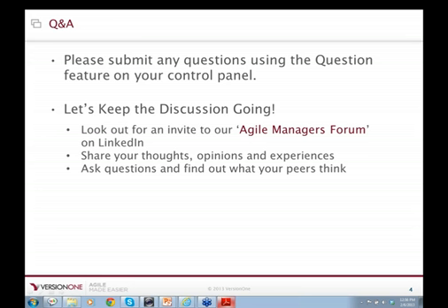One of the things that we've been talking about is putting acceptance criteria on every single level. So to answer the question directly, if an epic has acceptance criteria and a definition of done, and a feature has acceptance criteria and a definition of done, and a user story does, and all of that rolls up, then absolutely. That's a way to encourage that shared understanding.